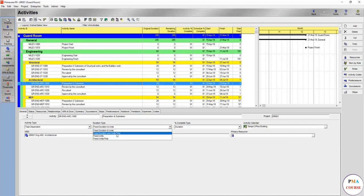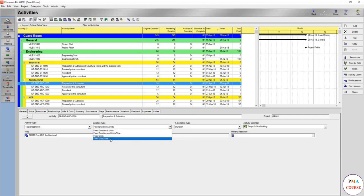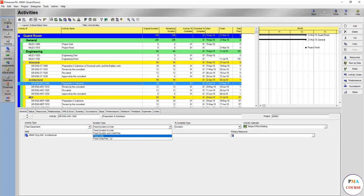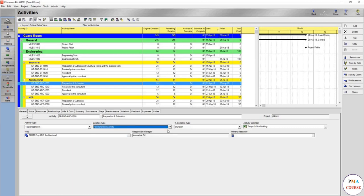Unless fixed units only, you will add the units but the duration is not fixed. As you see, fixed units per time, this means that you are going to do let's say 10 blocks per one day and the duration will be assigned. Or you will do only 10 blocks and you put each and everything and the duration will be assigned. But this one is the most used.